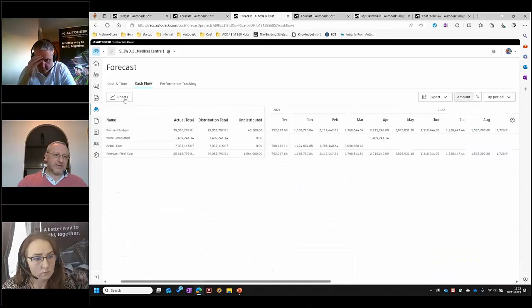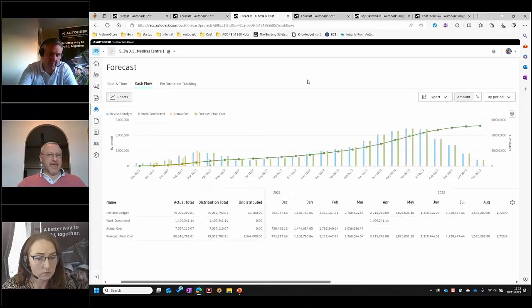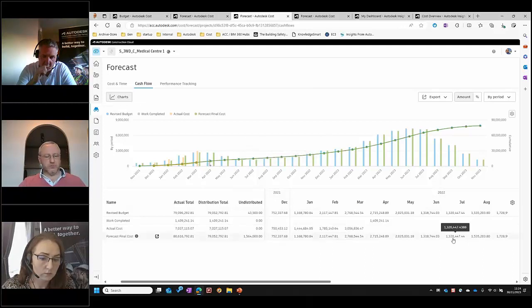So when we look at all of that coming together, and we've got our actuals, our payment requests, all of our change orders, we can start to map that out based on distributions that we build. So we'll build out those distributions. When do we expect to pay the money out? When do we expect to get the money in? What does that distribution look like? When does it start? When does it end? Okay, so we can map all of those out.